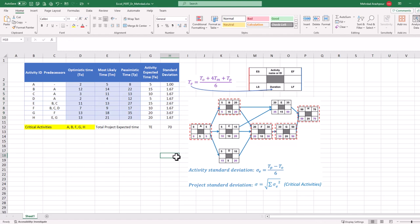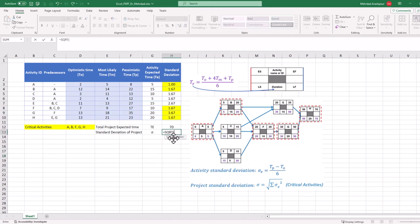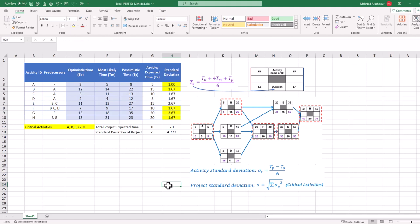We should then find the standard deviation of the project, or sigma, using the second formula below our CPM. Sigma is calculated using the standard deviation of critical activities, which are A, B, F, G, H in this project. First, we click on the relevant cell and press the equal sign. Then use the square root function and in parentheses, we add up the square of standard deviations for critical activities. The standard deviation of 4.773 indicates the amount of variability or spread around the mean completion time of 70 days in our project. This concludes the second step in implementing PERT in Excel.